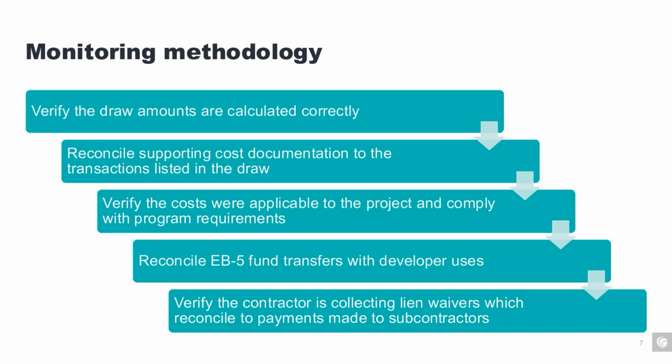All of the source documents that enable an invoice to be representative of the entire cost package should be part of the draw management review. And the reason for this is that unless these costs can be verified, it completely erodes the integrity of the consultant report.